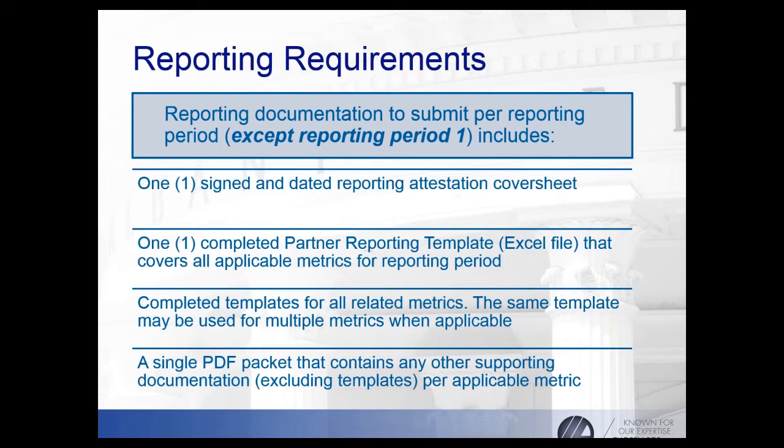For reporting period 3, what we do want to call out is that you do have some metrics such as patient engagement and impact analysis, data registry, such that if those are applicable to you based on your project selection and your partner type, there might be quarterly and monthly reports that must be submitted 10 days after the completion date listed in the project activity schedule.